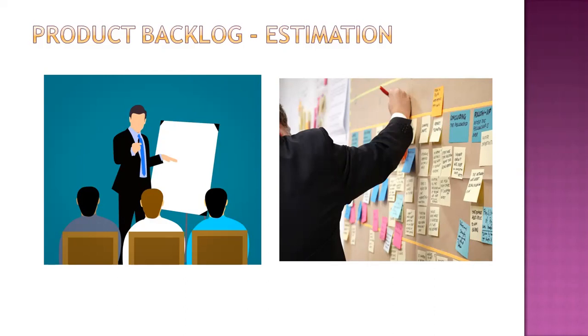It should encourage more and more discussion, requirement elaboration and getting more details, so that as a team, we all know what is expected. And now we are in a situation to estimate it, and to identify dependencies and risks of this particular work item. That is the whole purpose of refinement, not story design.